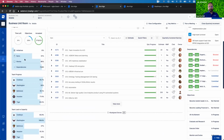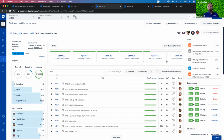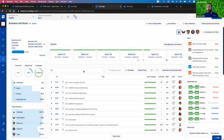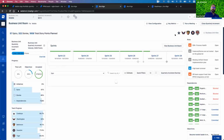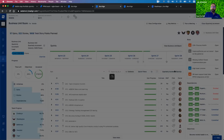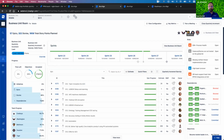On the left side here, you can see we can track progress against different work items, the teams themselves, and their load versus capacity for the different teams that make up the program. Here we can track the current sprint progress and how we've been able to deliver in green against what's left to do in gray. You can, of course, drill through and see information related to specific teams. If I drill on any of them, I'll have only the information that relates to that team, the risk related to that team, et cetera. But I'm going to go back to the top layer view. And finally, you can also get indicators that, once again, are fairly hard to get when you work across teams in Jira, such as quarterly increment burn down that will have the whole scope of those different teams here. So this is really helpful because of that comprehension of the object level. You have a lot of visibility there.